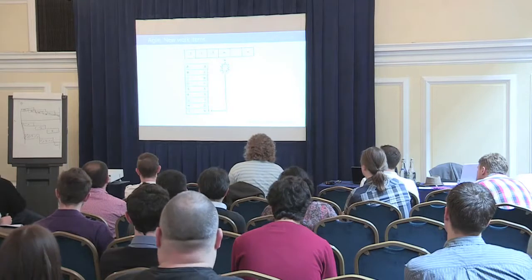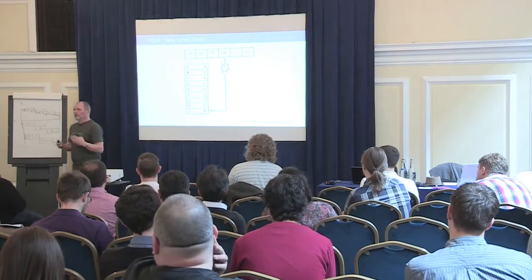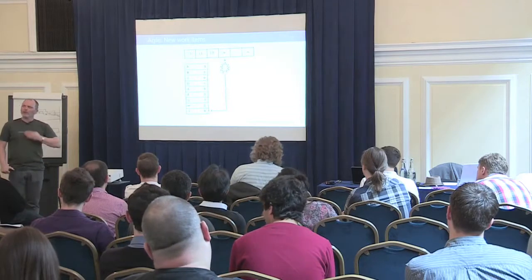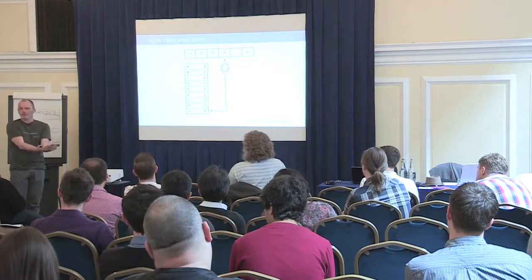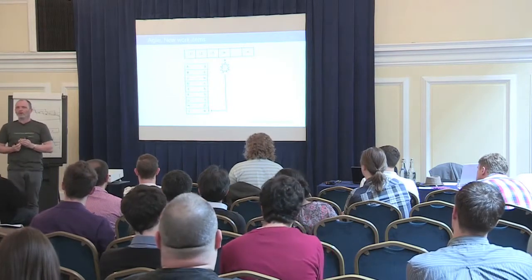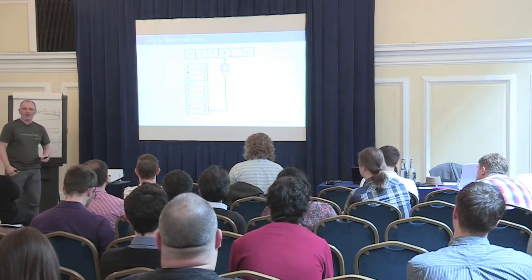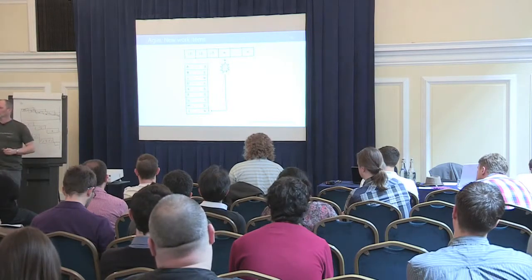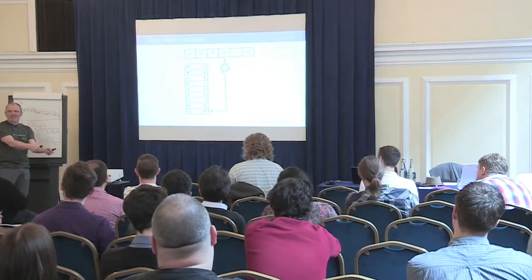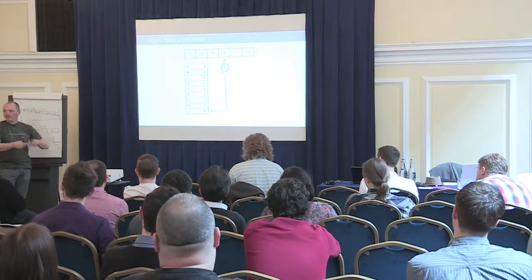So what's next? The next thing is, Agile is, well, let's put it in the words of Kent Beck, embracing change. So you allow your project to change, right? You allow your requirements to change. You allow new requirements into the project. If you do that in a waterfall project, the project will get into trouble. Well, basically, because they don't plan for changes, right? So what they usually do in a waterfall project is they fill in a change request form. You've all seen them, right? And they put them on a pile, and when the project is done, if it's ever done, they'll pick up this huge stack of change requests and start working on those.